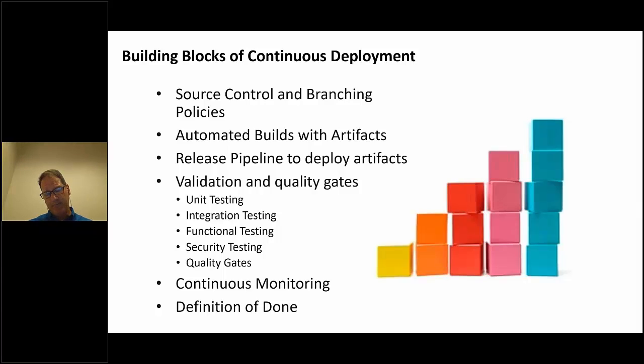We have a definition of done that says, I'm done with a feature, I'm done with an additional piece of functionality when I actually see it in production, and my customers or my stakeholders, my users say, yeah, I got it, it's good, looks great, thumbs up, okay, then I'm done. I'm not done when I check it into source control. I'm done when customers are actually using it.